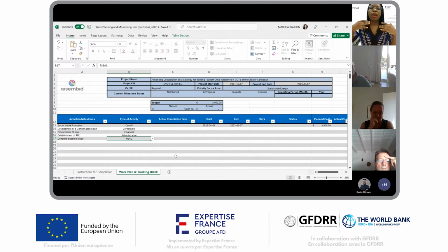That would fall under your establishment of your project management unit or your project execution unit, whatever you call it. And all of the associated costs for the establishment of that unit would fall under this particular item. All right. So we'll put our start and end date for each of these as indicated earlier.